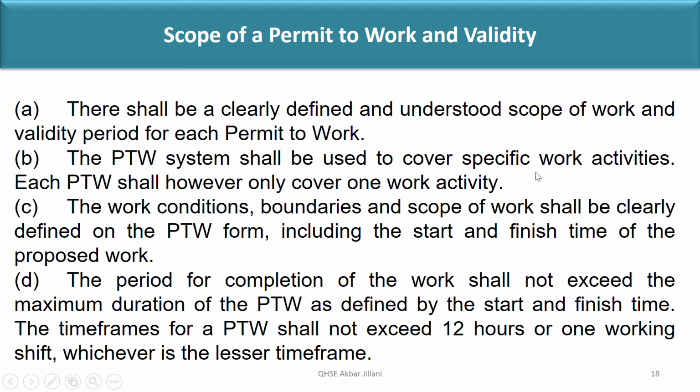The PTW system shall be used to cover specific work activities. Each PTW shall, however, only cover one work activity. The work conditions, boundaries, and scope of work shall be clearly defined on the PTW form, including the start and finish time of the proposed work.